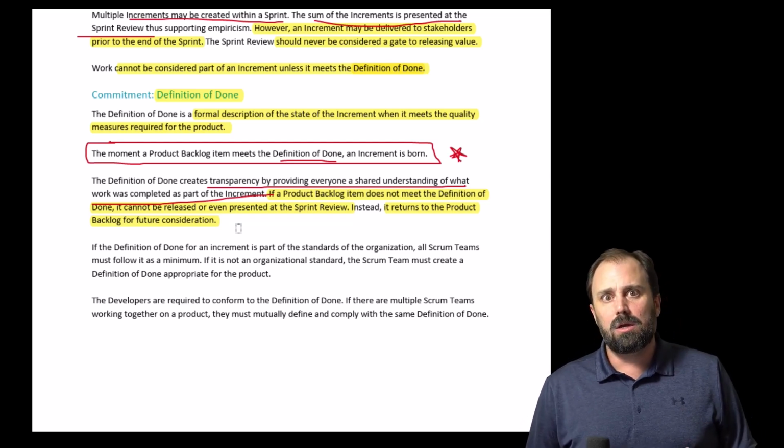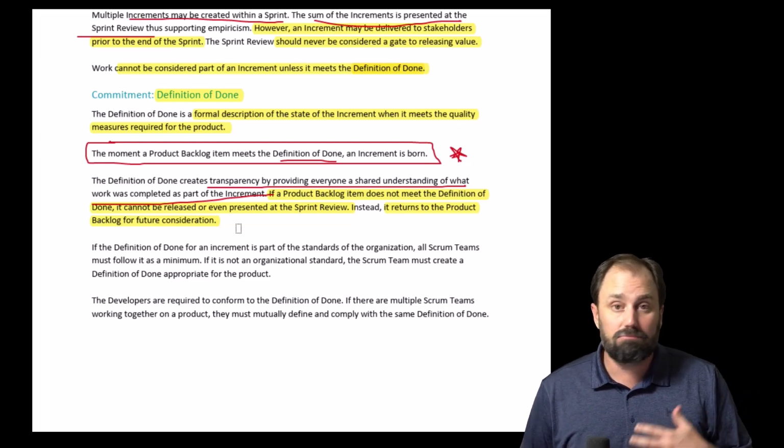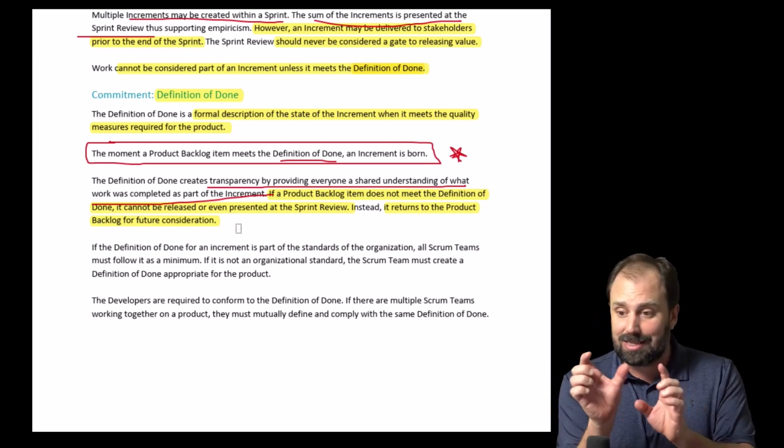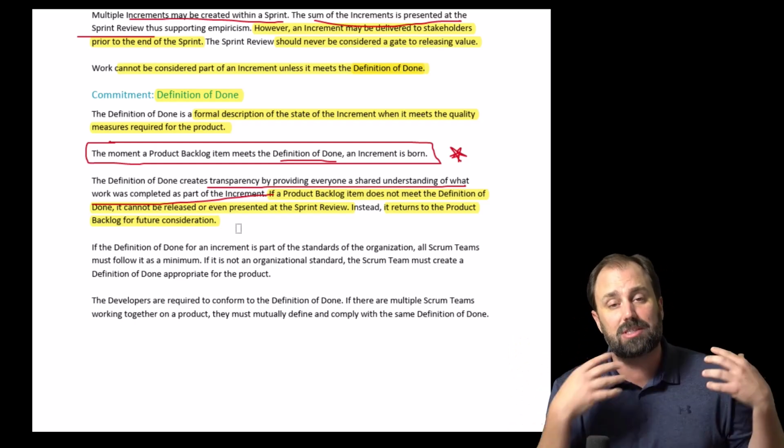Or it might be, we've got to move to something else. I want to do it, but it ain't the right time. We'll come back later. Whatever the decision, it is not going to be a buffer time. Oh, we'll do it now. No, it goes back to the backlog. Next sprint starts. Decisions got to be made.